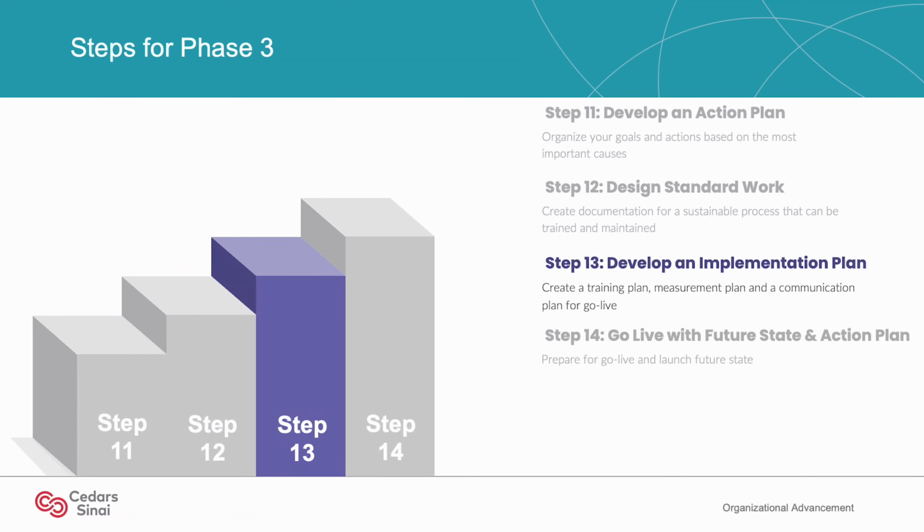Let's move into step 13, which is developing an implementation plan. In this step, the team will create a training plan, a measurement plan, and a communication plan in preparation for go live.